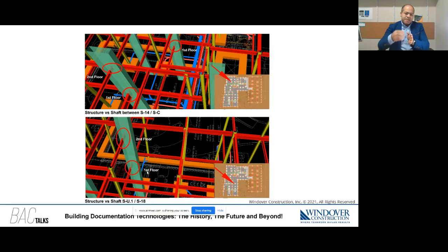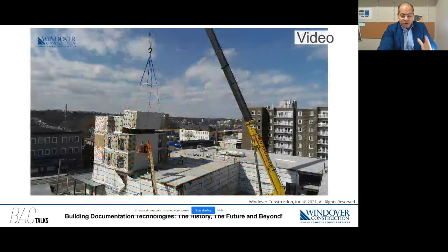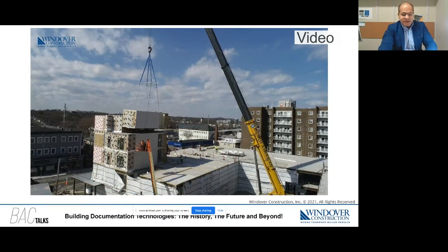Time is critical here. When it gets communicated in real time, it can save thousands of dollars. And what's more important, actually, than even the cost, is the time. Because imagine if you have a box arrive on site, you will have to make all these edits to it, and that delays the schedule. With this, Wendover were able to shed 3 months off the schedule, which is great to deliver a project earlier and on time.